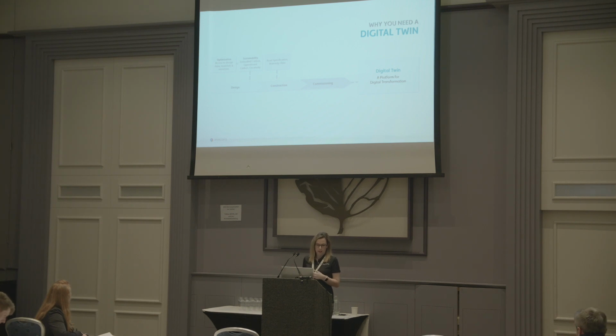I'll go into this in a little bit more detail, but collecting construction data without overwriting the design data. We see the value in the design process and the information that's created at the design stage, and that we don't want to just take in a new model and replace that data. We want to ensure that data is captured and maintained. And then at commissioning, complete and efficient handover, and then assessing the as designed versus the as built. And then on top of the digital twin, we can put various platforms for maintenance, streamlining, leasing, and trying to put a single source for all of the project information.